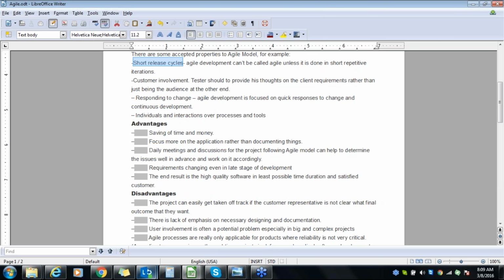But in waterfall, we have a set of requirements already defined, and if someone comes at the end of testing or at the end of development, you have to stop the release. You have to go back to the initiation and analysis part, and you have to rework everything from the start. Here the halt or the stopping of the release will not be there. At least you will say that from the next sprint we will cover it. For obvious reasons, because everyone is involved, you will have a lot of feedback, right? So the end result will be of high quality.